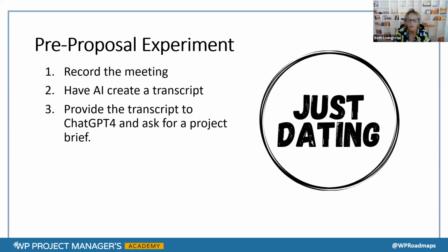But when you go to do your pre-proposal discussion with the client, record the meeting, then use Descript or Otter AI or something like that to create a transcript, and then provide the transcript to ChatGPT and ask it to create a project brief and see what happens. I'd be interested to see.